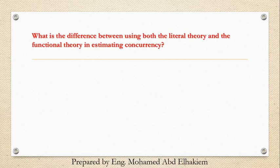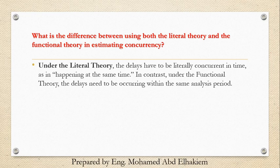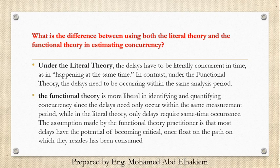What is the difference between using the littoral theory and the functional theory in estimating concurrency? Under the littoral theory, the delays have to be literally concurrent in time — happening at the same time. In contrast, under the functional theory, the delays need only be occurring within the same analysis period. The functional theory is more liberal in identifying and quantifying concurrency, since the delays need only occur within the same measurement period, while in the littoral theory, delays require same-time occurrence. The assumption made by the functional theory practitioner is that most delays have the potential of becoming critical once float on the path on which they reside has been consumed.